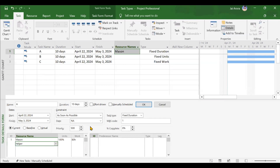Before clicking OK, analyze what will happen when adding one more resource. The duration is 10 days and this is a fixed duration activity, so this 10 days will not change at any cost. You can add 100, 200, or 1000 resources, but the 10-day duration will not change. The activity must complete in 10 days regardless.